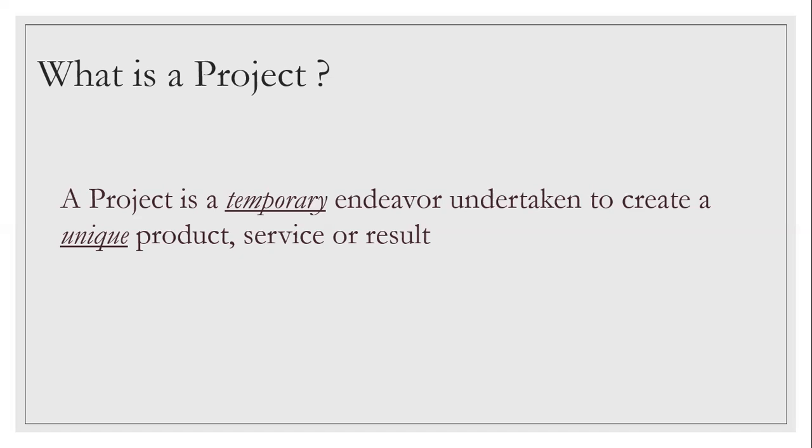There is no end to that. 1 month, 2 months, 6 months, 8 months, 10 months, you keep on doing that, right? You are paid very nicely for that, by the way. So that's a job, right? Now, will that be counted as a project? By definition, no. Why? Because it's not having an end date, right? It's got a start date, of course, but it's not having any end date. So anything which is not having an end date is not falling in the bracket of a project, right?